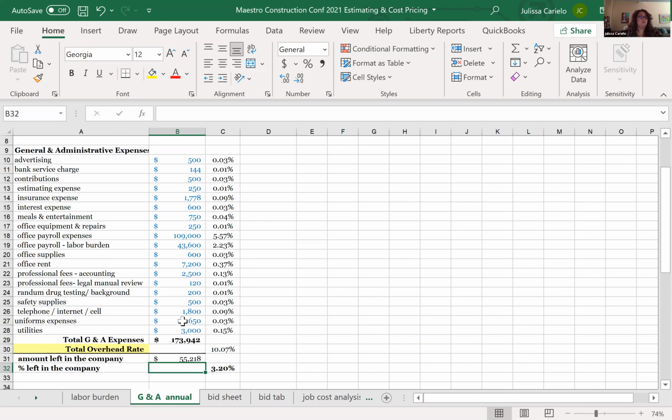And so the question always comes to, where do I charge myself as the owner? Well, you start charging yourself in here first, but you also can charge yourself on the project as a project manager. So you charge on both buckets, because you want to be able to afford a project manager eventually so you're able to step away, but you've got to charge for it in order for it to show up.